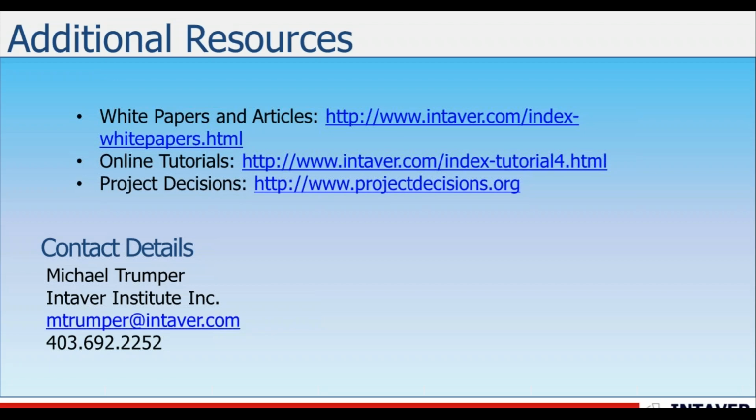So currently you would be able to export a risk-adjusted schedule to Primavera P6 using an XML file and turn it into a performance. And you could export that out at any particular level of the system. So let me just go back to the application.